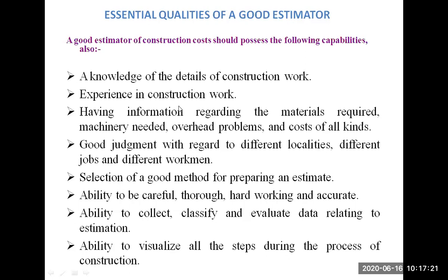Every day you need to prepare that schedule, which we present in our bar charts. You are going to observe that bar chart in any office. In that bar chart, the schedule is there. Suppose today's date is 16th of June. On 16th of June, I'm going to complete this activity. 17th of June, I'm going to complete this activity. 18th of June, I'm going to complete painting work. 19th of June, plastering. 20th of June, and so on.